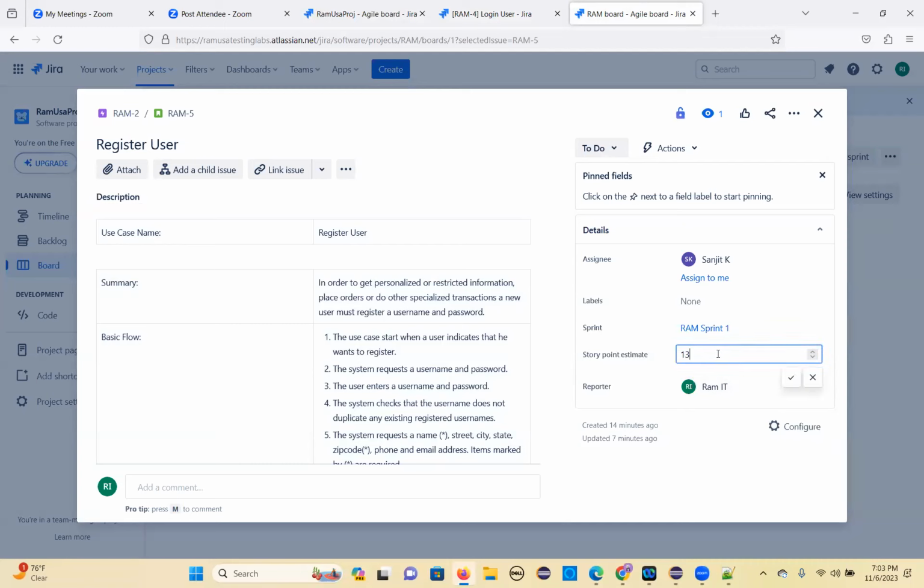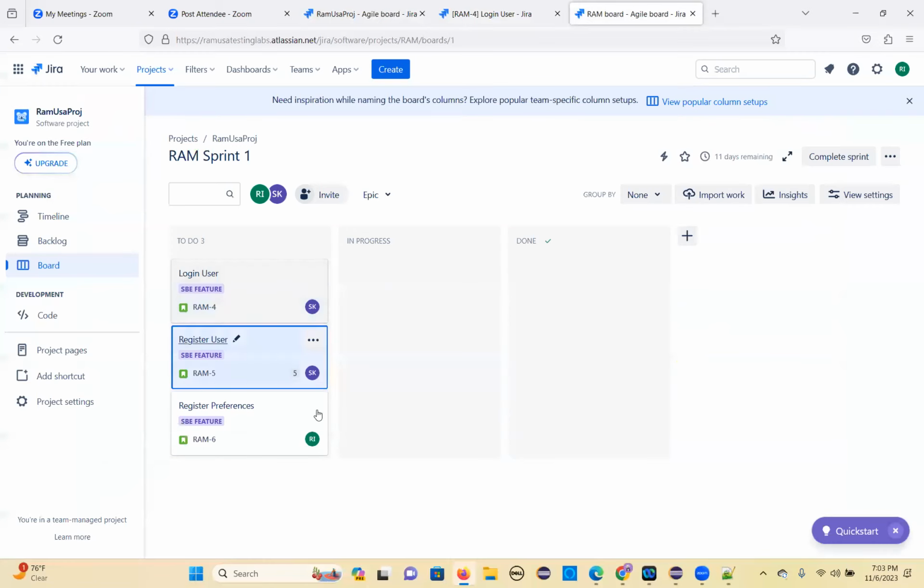So basically developers stories will be there, and also QA stories will be there. So this is the developer story, right? Developer story means developer will work. He will take maybe 8, 5 user stories. And under this, there will be a QA story also. So they will create a QA story, and for that one they will assign.